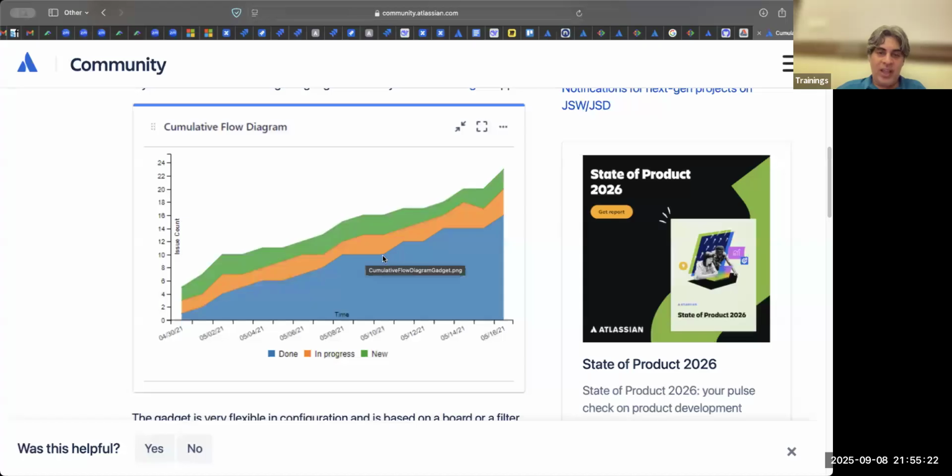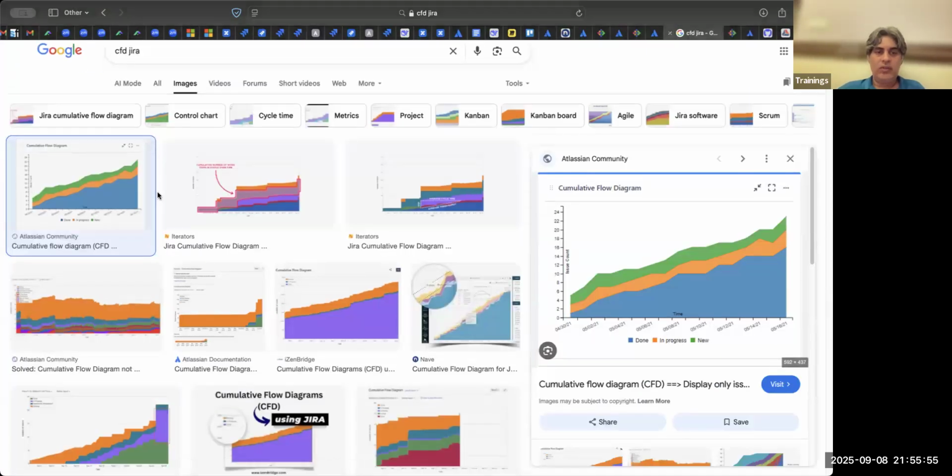Now again, from 10th till 12th, suddenly we were able to close a lot of tickets. See, these are how many tickets? So if I look at this from this point, these are 10 tickets and 14. I think we closed 3 or 4 tickets. And this is why in progress got narrowed. So this is all you need to know for now, that this is how you can read these charts to find out if there is a problem in the flow of your team. This is enough for your interview needs.